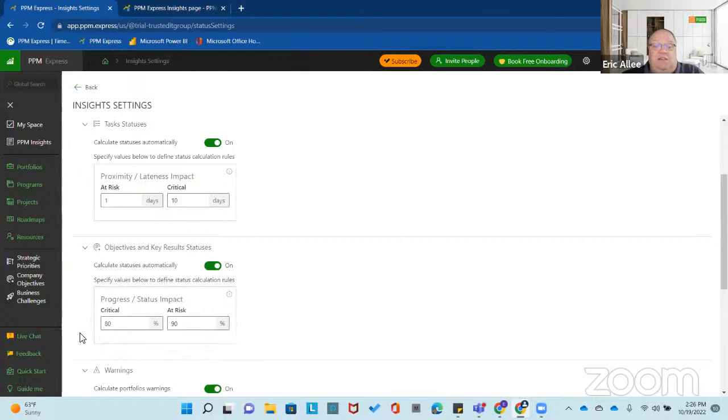So what this means is that if I'm not at 80% when I should be, then I'm critical. If I'm at 90%, I would be at risk. It's not the perfect example because it doesn't quite blend, but that's the idea. Between 80 and 89, I will be critical.